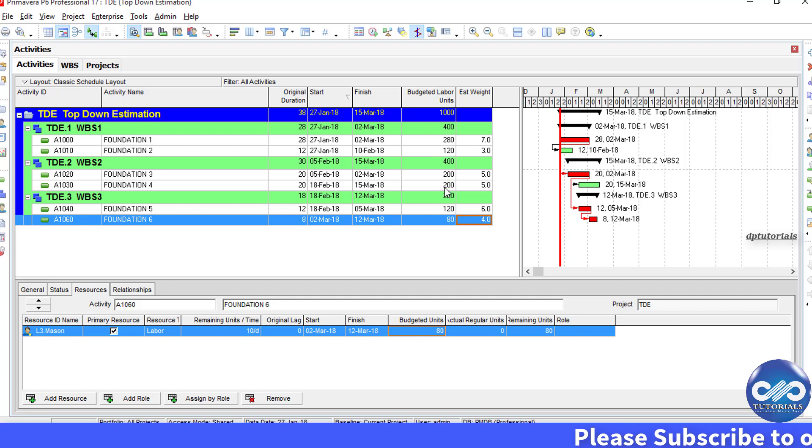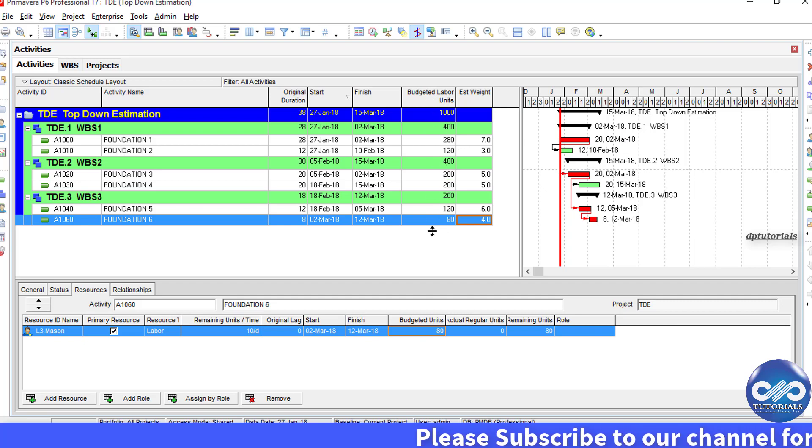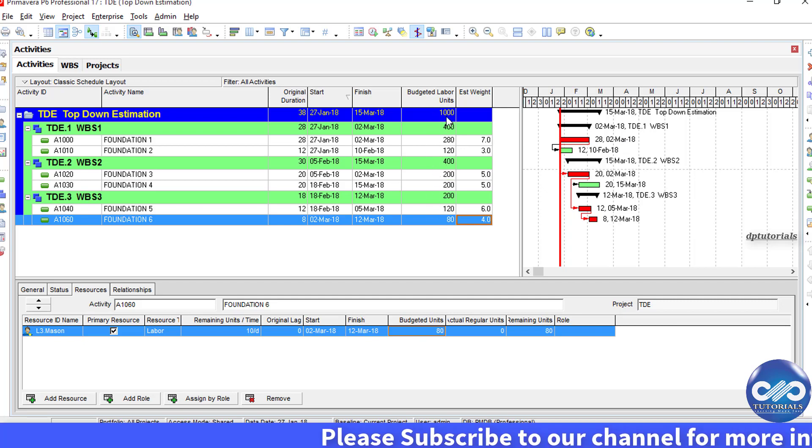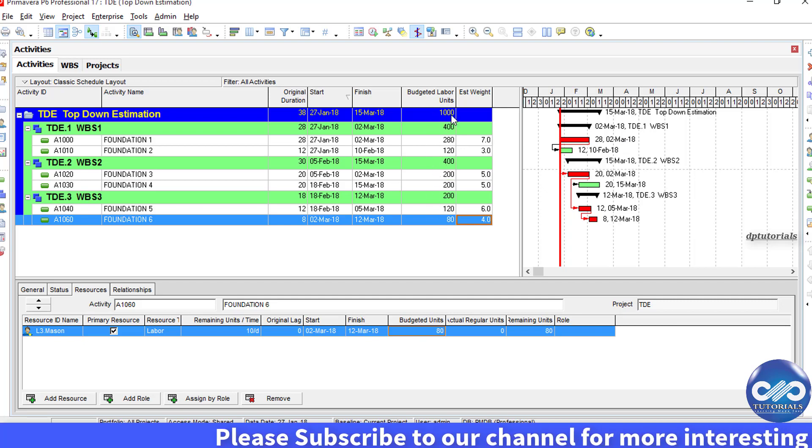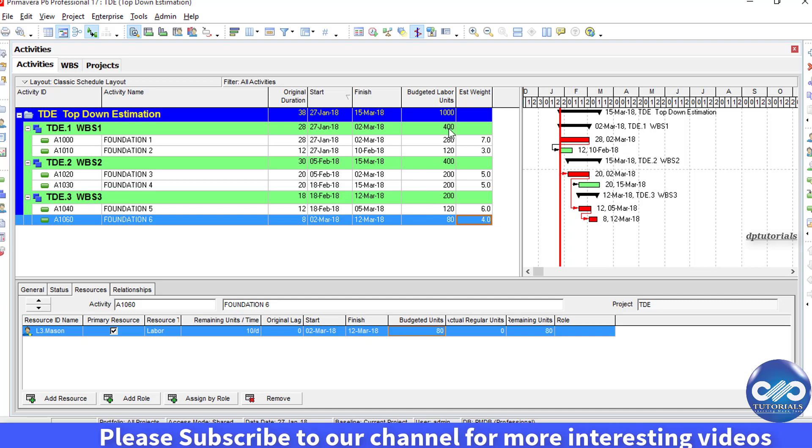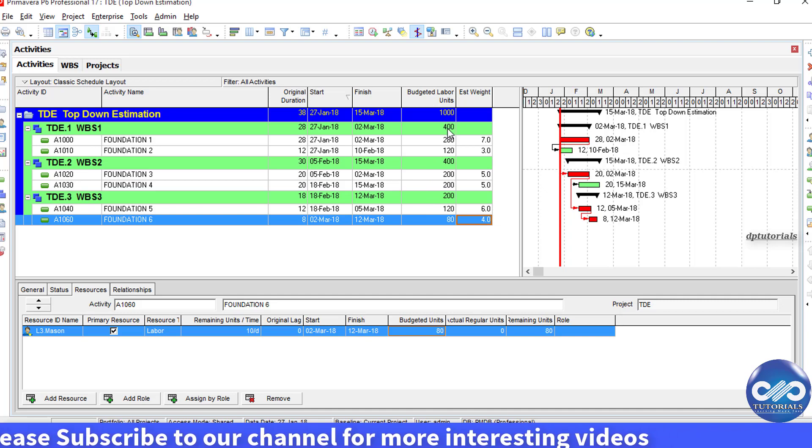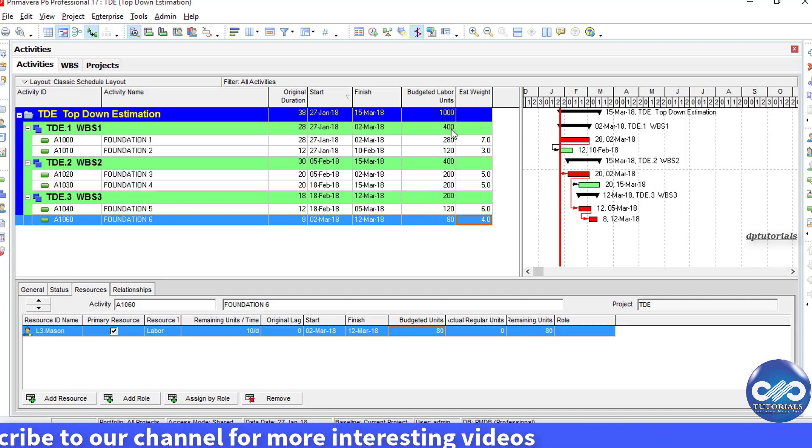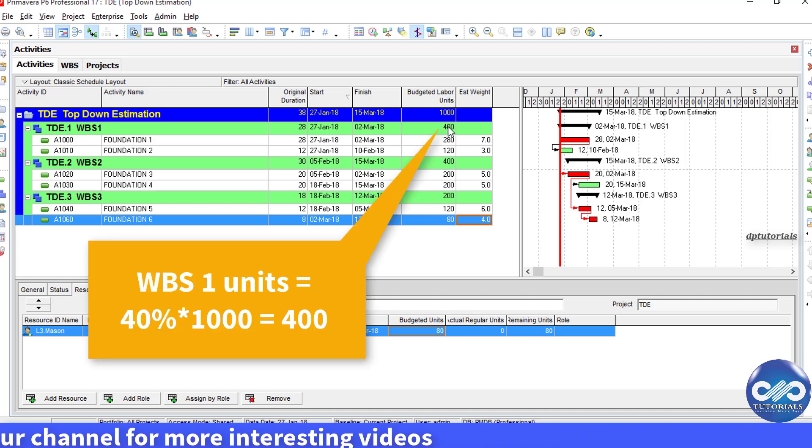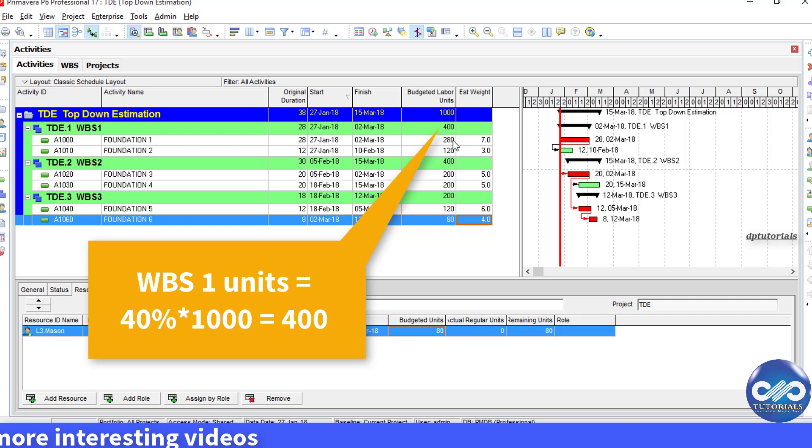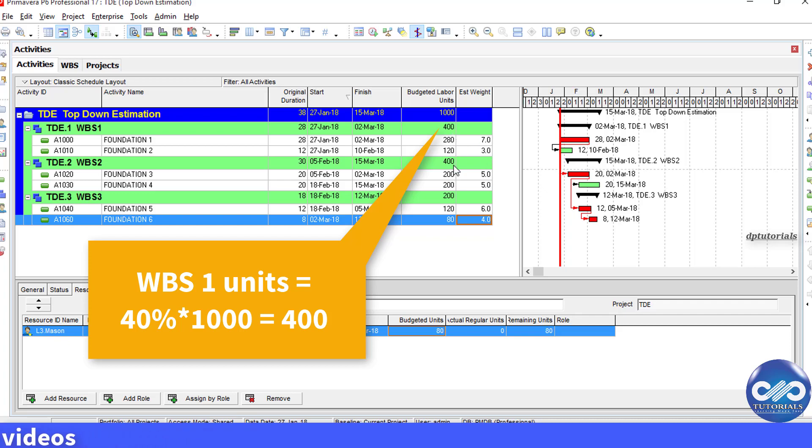See, you can see that the units are distributed according to the estimated weight which we have assigned to them. For example, for the WPS1, the weightage is 4, that is 40%. That means out of 1000, 40% is 400 units will be given to the WPS1.